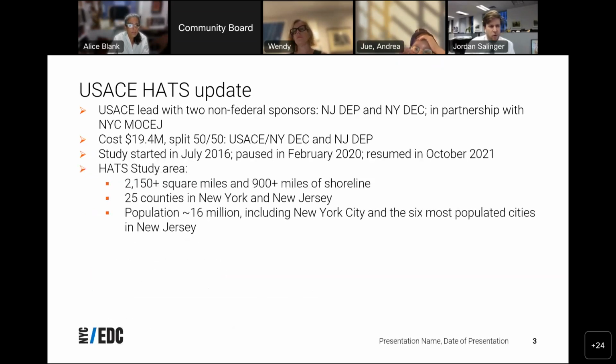Next slide. So I know that this board has received a presentation from the Army Corps on their HATS study. This is the harbor and tributary study. So some folks may be familiar, but it is an effort that has been going on the last several years, roughly just under $20 million effort that is a partnership between the Army Corps, New York DEC, New Jersey DEP, those are the federal and state sponsors, as well as our office, broader city of New York. This is an effort that started in 2016, was paused in February 2020 due to funding constraints, and then resumed this past October.